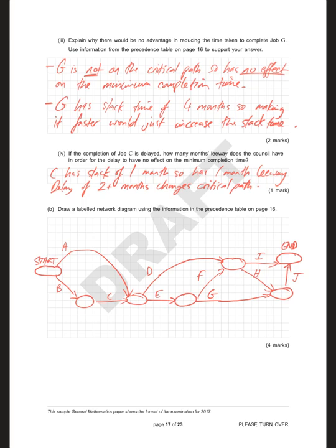So just double check. J requires G and H. I requires D and F. H requires D and F. G requires E. F requires E. E requires A and C. D requires A and C. C requires B. A and B require nothing.